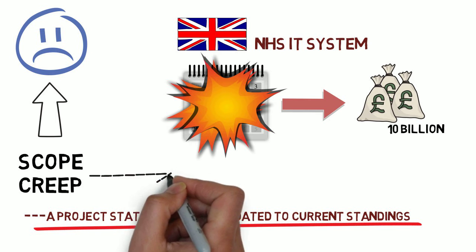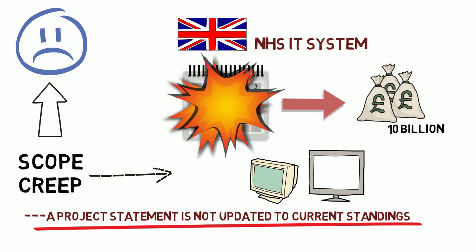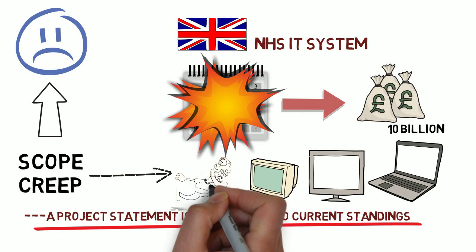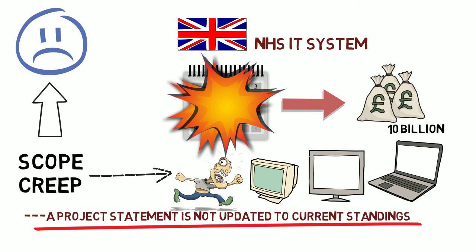The project suffered from scope creep. As more advancements came present with time, the IT system that the NHS chose to install was becoming inferior. The project scope gave no room to change supply companies or update their plan. With poor scheduling, the installation of the system started to become idle, and the project began to delay. With more and more money incentives from the government, the project started to become a large expense.